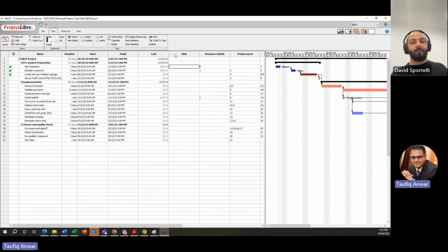The idea is, if you think about 2 tasks, for instance, this task and this task, you have to understand the relationship between them. If this task has to finish in order for this task to commence, meaning this task finishes and then this task starts, that's the relationship of FS, finish to start. The relationship between the predecessor and the successor is finish to start.